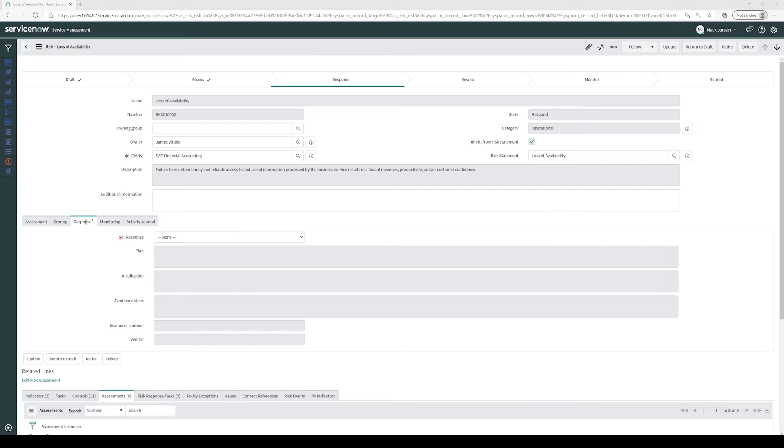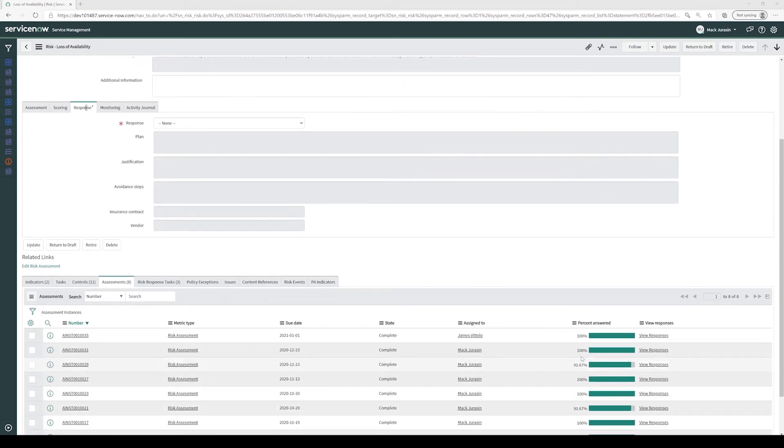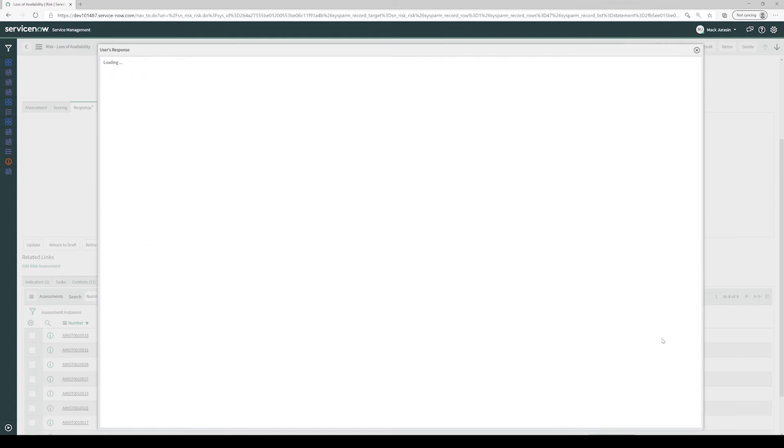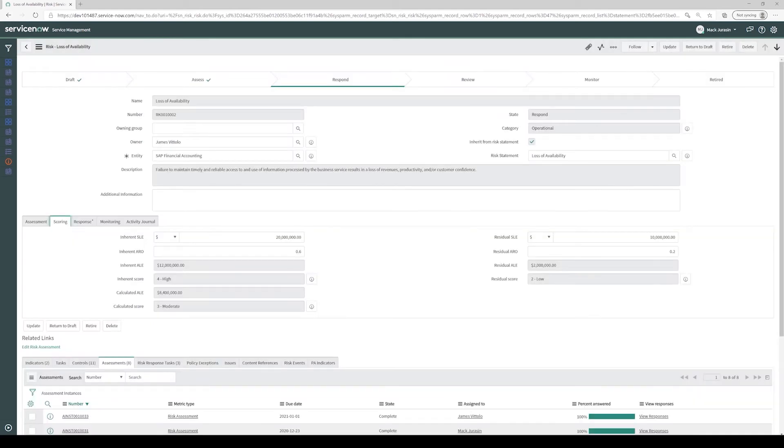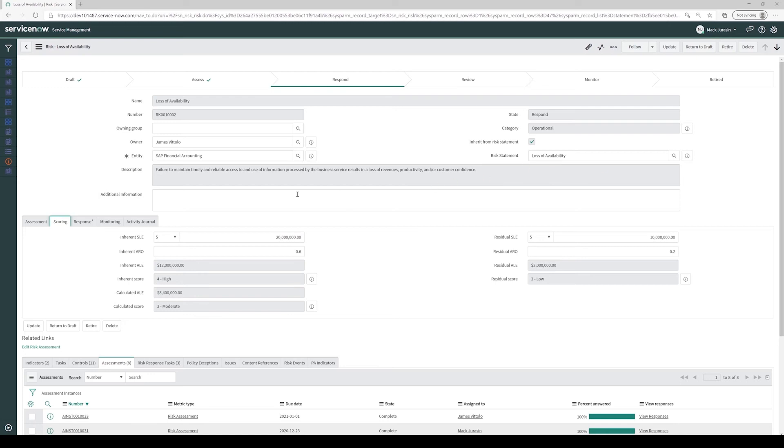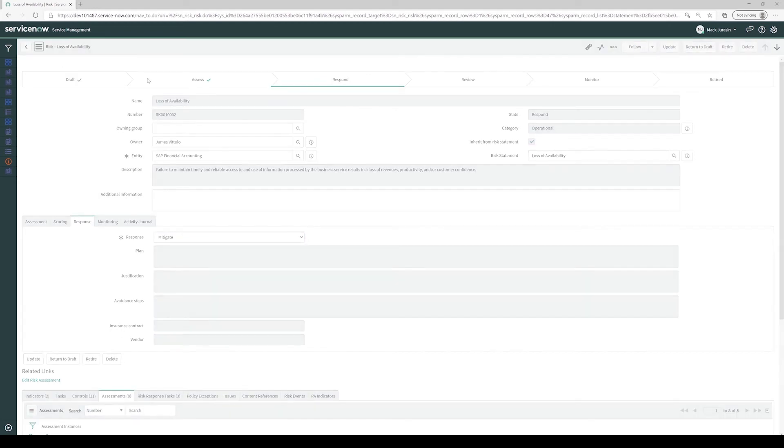After the risk owner completes the risk assessment, the risk analyst returns to find the risk in the response state. The risk analyst is able to view the risk owner responses. This helps the risk analyst inform the appropriate risk response, which includes Accept, Avoid, Mitigate, or Transfer, and to determine the appropriate risk scoring of inherent SLE, inherent ARO, residual SLE, and residual ARO. Once the analyst is satisfied with the inherent and residual risk scoring, the analyst selects the response tab and then selects the appropriate risk response. In this case, the analyst will select Mitigate and then select Save from the menu.